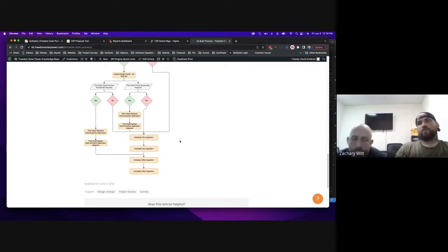And did we go over like what's required as far as a red line sketch and information to design? Basically, guys, I don't want designers doing investigative work to figure out what's changed. You need to tell them exactly what's changed so they can open up the design, move solar panels, change wire size, whatever, and get this thing submitted. Right? And the ROM is the only one who knows exactly what. So, and you guys have to be the ones who approve this.